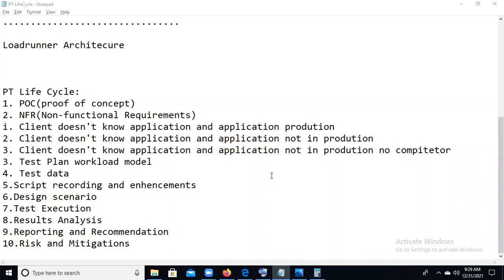A test plan contains the objective, the scope, what kind of testing we need to do, how many labor hours to finish this project, and our deliverable dates, like when we start the test and when we can start execution, and the deliverable sign-off date. We also need to mention our hardware, like CPU and memory utilization details: how many CPUs we have, and what memory we are using. So everything we can mention in the test plan.